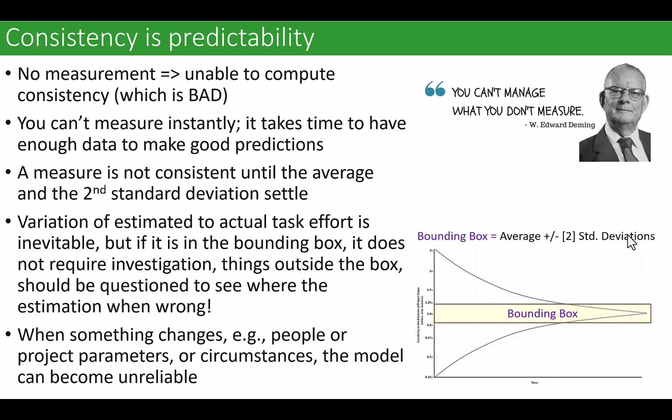And if you've done stats, you talk about, well, you're pretty much on target with something that has kind of a linear progression. If you have identified the average and the standard deviation, and the bounding box is defined by the average plus and minus 2 standard deviations, you should see a tendency, not in individual stories necessarily, but in the aggregate, for those things to go to the average.